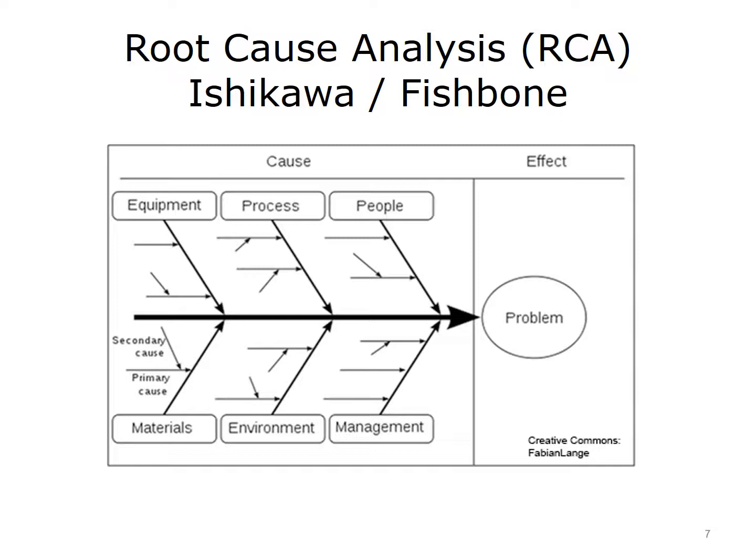The fishbone or Ishikawa diagram, as shown on this slide, is a tool which helps you explore all potential or real causes that result in a single defect or failure. Once all inputs are established on the fishbone, you can use additional techniques to drill down to the root causes.